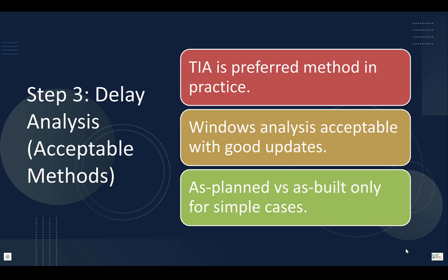Step number 3, perform delay analysis. Under AACE 29R-03 and the SCL protocol, the most credible methods are: first, time impact analysis, TIA. This is the best method when the delay event is contemporaneous.